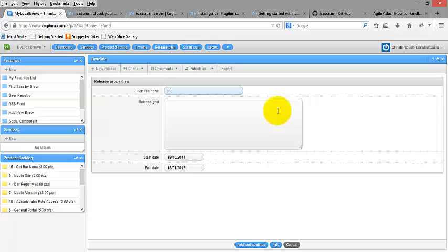Release planning consists of the association of stories from the backlog to sprints of the release. Only estimated stories are candidates for planning, and the sprint must also be created. It's possible to later change the associations, meaning moving a story from one sprint to another.